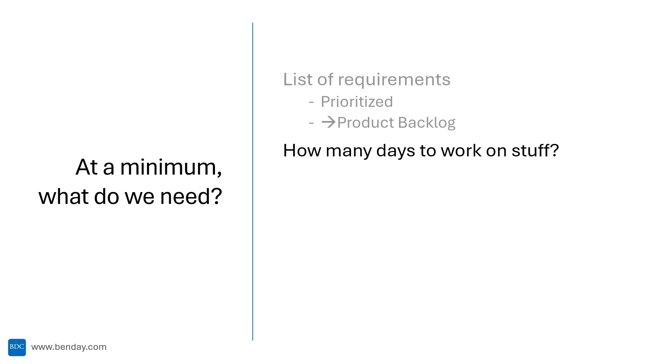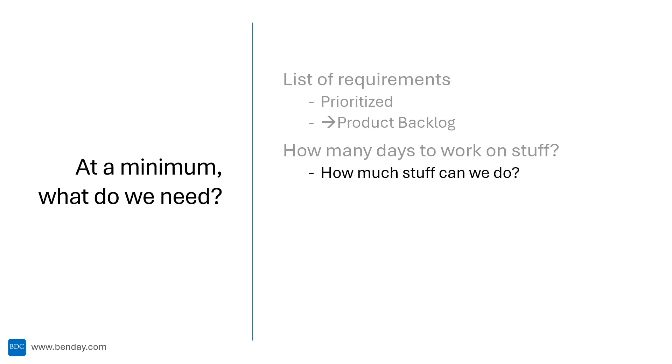The next big question is how many days do we have available? How many days can we work? What's our capacity? This gets us towards answering the question of how much stuff can we reasonably do in a certain period of time. This period of time in Scrum is known as a sprint. Sprints are 30 days or less. This capacity information leads into the Scrum sprint planning meeting where we plan out what we can do or are likely to do in a given sprint.